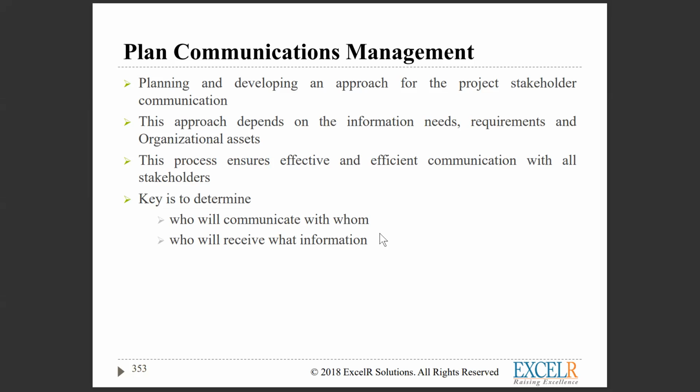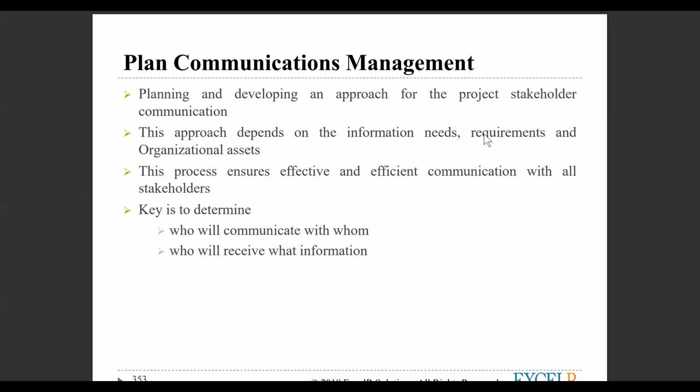That's how you are defining it, because sometimes there is a habit of stakeholders. They will go and directly talk to your team members. So you should ensure that you set the protocol saying that for the stakeholder, only the project manager can talk.